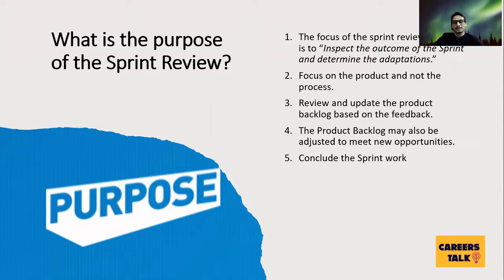Collaboration between the Scrum team and its stakeholders is the key during the sprint review. The sprint review aims to get feedback from the stakeholders on the user stories done during the sprint. The definition of done for user stories includes deployment to production, acceptance testing, and anything else needed to potentially release the user story to the final user. This is the deliverable and the end goal of the sprint. The whole meeting should be focused on reviewing the shippable product increment.